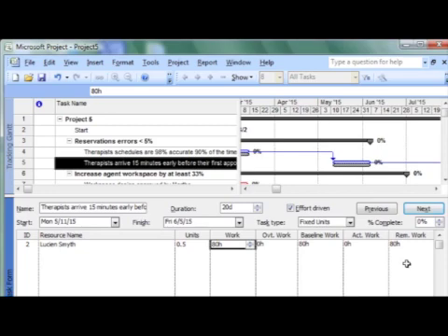So as I mentioned before, we want the team members to give us two numbers: the amount of actual work they've completed and their estimate of the amount of work remaining. That forecast of the remaining hours of work is the key to status reporting because it lets us identify problems when they're small and easier to fix. So with our views all set up on both of our projects, let's start entering status reports.